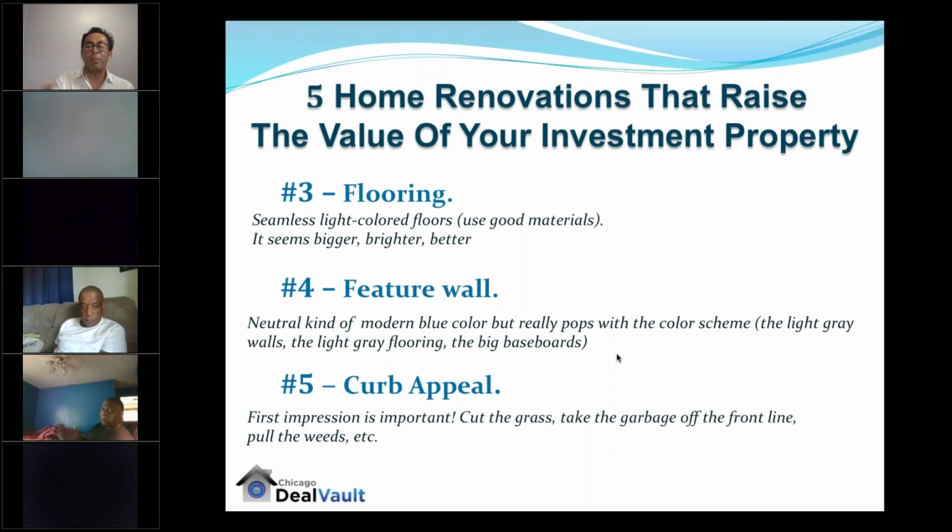I mean, think about this. Remember the chart I gave you at the beginning? For a house that is less than 2,000 square feet, your rehab shouldn't be more than 35,000 if it's average, right? You need to update the kitchen, the bathroom. So imagine if in one bathroom, half of your rehab money goes there. By the time you finish the kitchen and the rest, oh my goodness, you're going to be at 50, 60,000. So no, that's way too expensive.